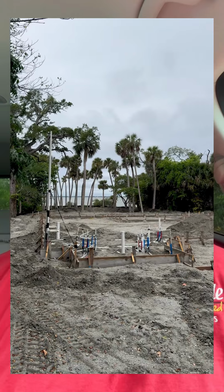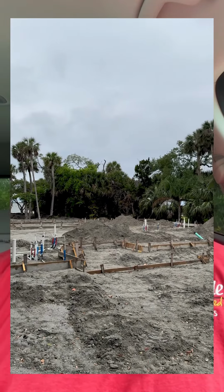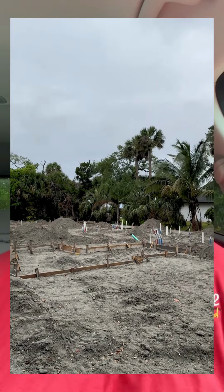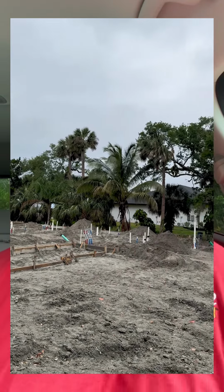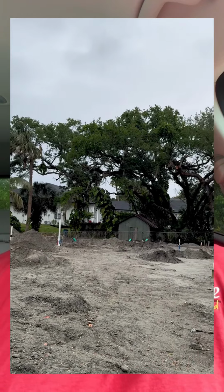Now, my mason's pretty fast and he can typically show up the next day. So if all goes according to plan, I may gain a couple days on the schedule. And that's a win-win for everyone involved. For my particular customer on this home who's paying cash, getting the build done sooner will put him in his home faster. And if they were using a construction loan, they'd also save money on interest payments. Plus my company gets paid sooner.